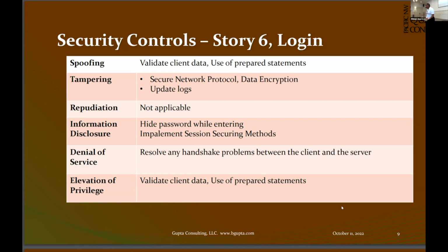So now here is a framework where we have agile development, and we have stories, and now we know which stories are of high risk and which are lower risk stories. So we can deal with that appropriately. If it's a high risk story, we want to do a lot of things about it. If it's a low risk story, we might even say, hey, if we don't have time to test it, we'll deal with it. It's just risk management. Okay?